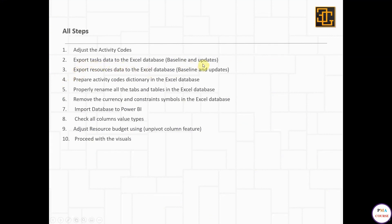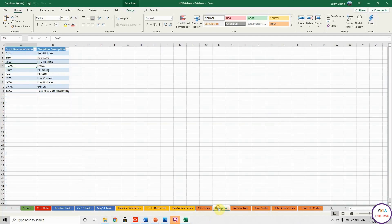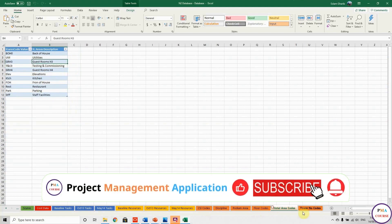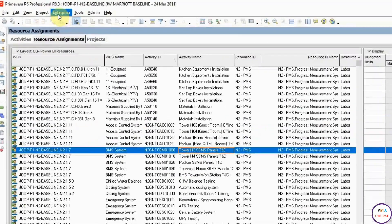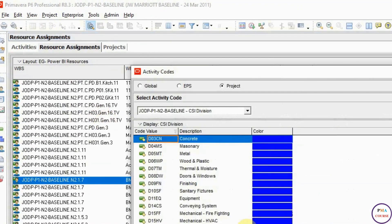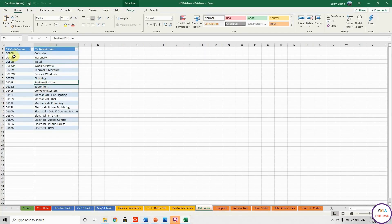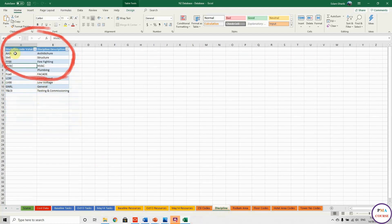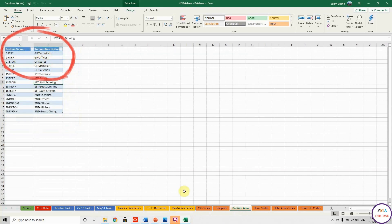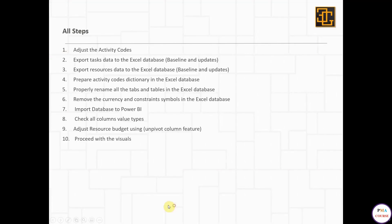Step four: prepare the activity code dictionary. To link the activity codes to the tasks, I prepare dictionary tables. I go to Primavera, then to Enterprise Activity Codes, copy all codes and paste them into my database — one by one for each code type. The only trick is I have to rename the headers properly, for example: CSI activity code, CSI description, discipline code value, discipline description, podium value, podium description.